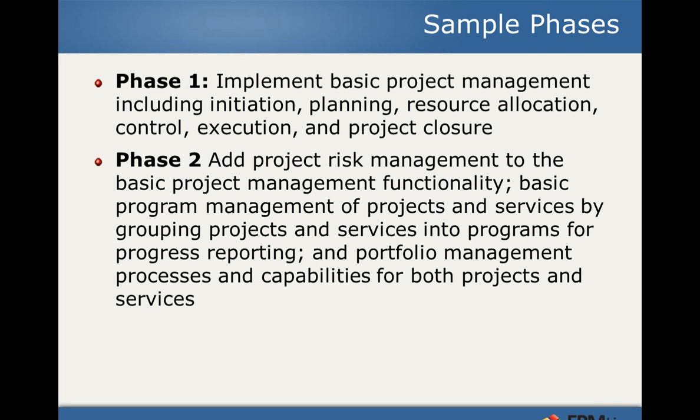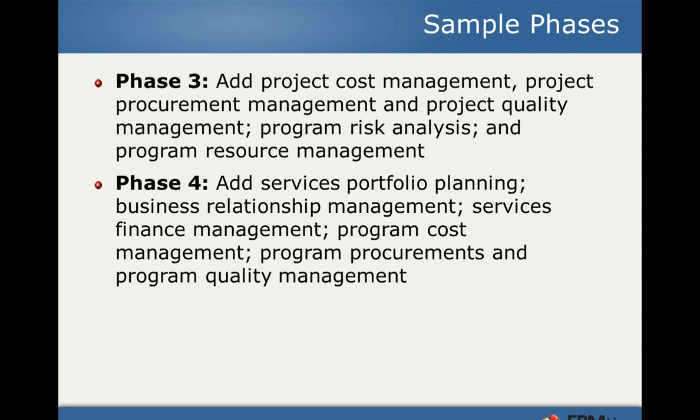Phase 3 might be starting to get more sophisticated and start really doing more cost management. There's a lot of folks that are doing project management from a deliverables, a task, and a resource perspective, and really not doing a detailed job of cost management. So maybe adding cost management, getting tied in with our procurement and our financial systems so that we get visibility and management over those things are something that could be added to the mix at a phase 3 in this